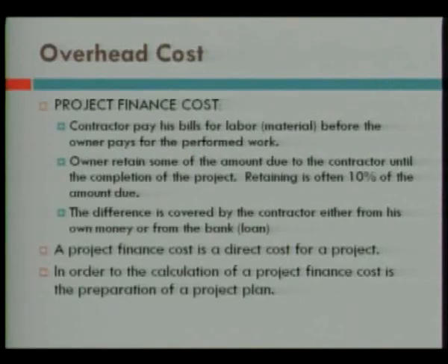One of the basic things that I have seen, and this is very important for small and medium sized contractors. First of all, whenever you have a project, let the project finance itself. Don't say, well, I'm short, I have to take from another project. This is a mistake. This is a big mistake.